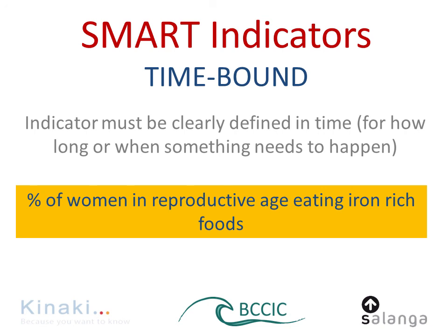Another reason why we should have a really clear time frame about the data and the indicator is that we really want to tie the results of the project to the actual project. So in many cases, we will limit the duration or the period of focus. We can limit it for the duration of the project, in the past year, in the past 2 years, or something like that. Whatever gives us a specific enough time frame that is relevant to the indicator.